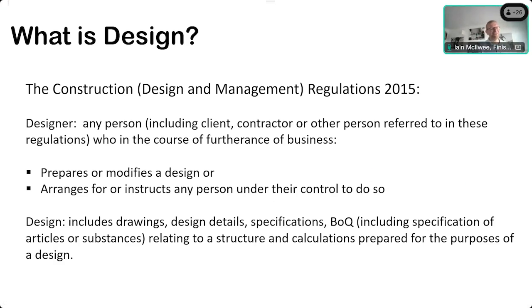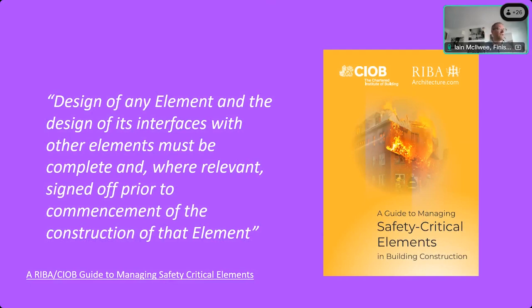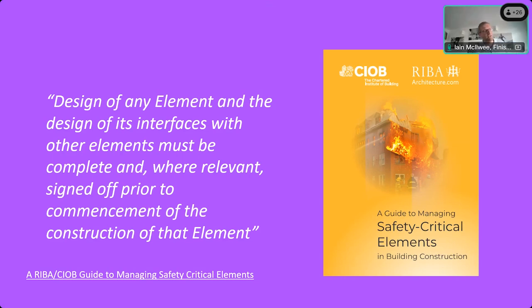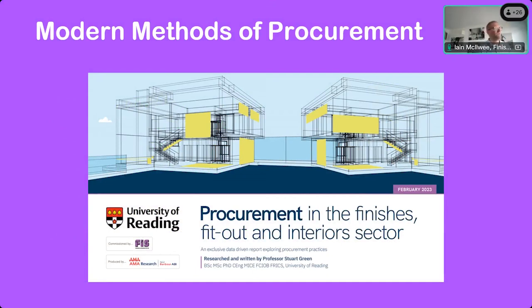So how does design development happen? There's been fantastic research done, including a report from CIOB and RIBA on safety-critical elements, which again repeats what we've heard before: the design at its interface and other elements must be complete and signed off prior to construction of that element. We must make sure information is prepared in advance of people starting to build. In 2023 FIS commissioned our own research to see what was actually happening on the ground, looking at whether suitable time and resource are being given to the project.